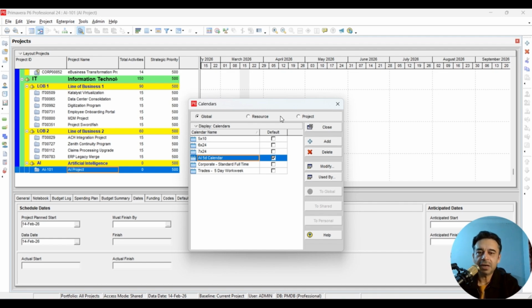So you are heavily depending on the crane, which means that the crane will have its own calendar. For example, if the crane's calendar says that the crane will be available only for 3 days in a week, which means your project will be executed for 3 days a week, because your project heavily depends on that resource, on that crane.